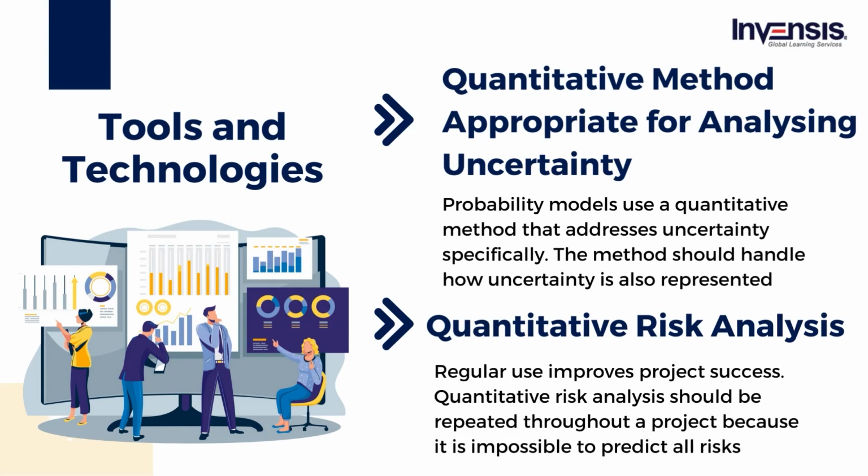We have data gathering tools. These tools used in this process include assessment of historical data and workshops, interviews, or questionnaires to gather quantified information, for instance, on the probability of a risk occurring, a probability distribution of its potential impacts on resources such as cost or time, and even relationships such as the correlation between risks. There must also be an effective presentation of quantitative analysis. Results from the quantitative tools are usually not obtainable in standard deterministic project management methods.